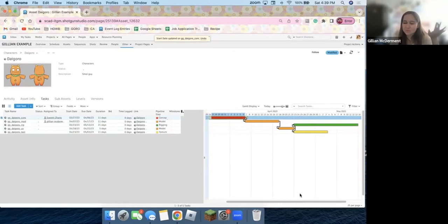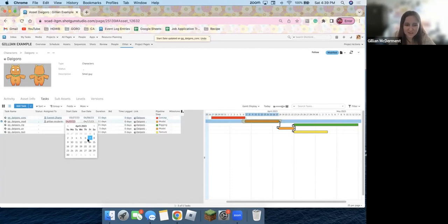It is up to you what colors you want to do. I like to do rainbows because I know that little order off the top of my head pretty easily. But yeah, so right here, as you can see, it assigned everything. But then again, I'm not going to start on that Friday. I'm going to enjoy my weekend. So actually, my start date is going to be that Monday. So it shifted everything around.